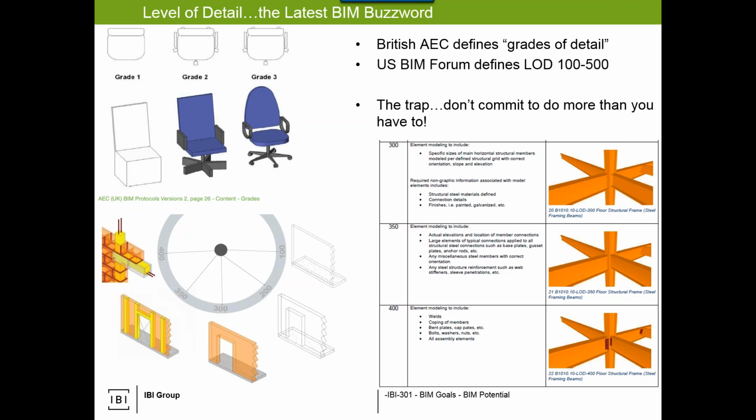So we always want to help to mitigate that, and we've done some dialogue back and forth where, if you look at the steel there, structural engineers will talk about connection details but won't design them. They get designed by the fabricator, stamped by the fabricator, and then delivered and assembled on site. So it's also about levels of responsibility and liability.